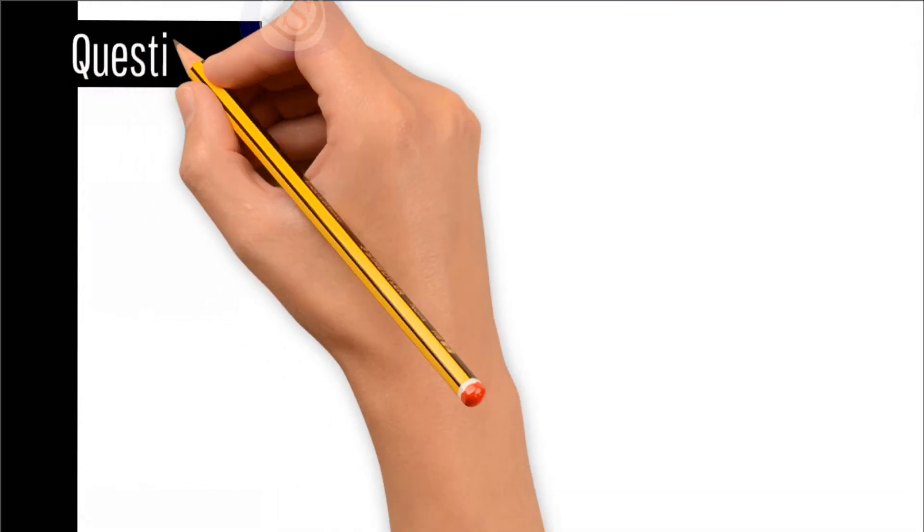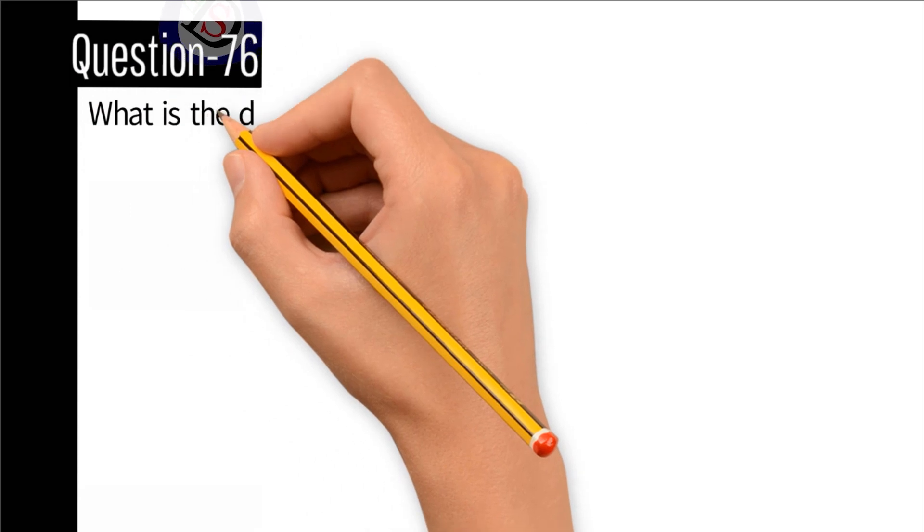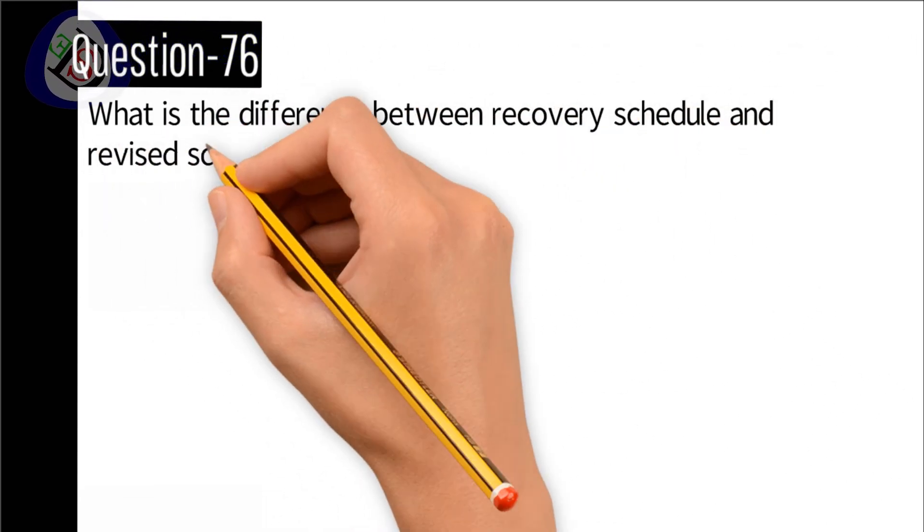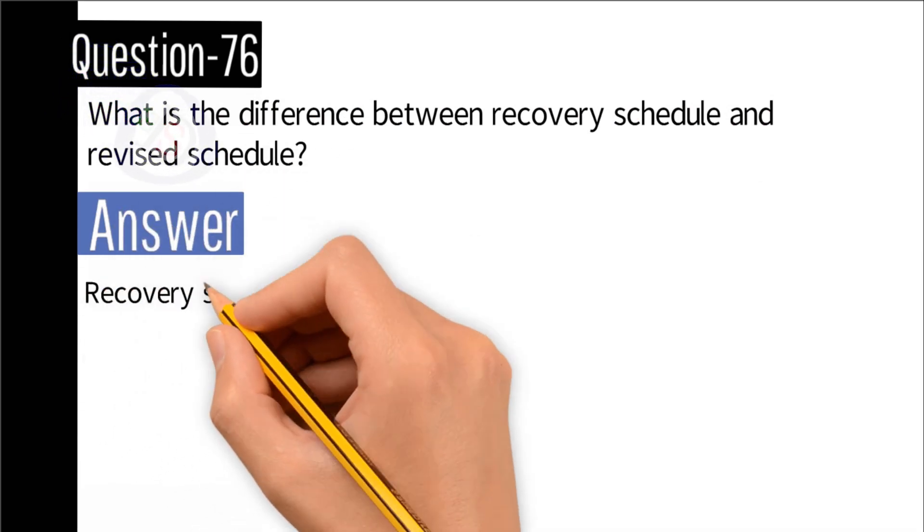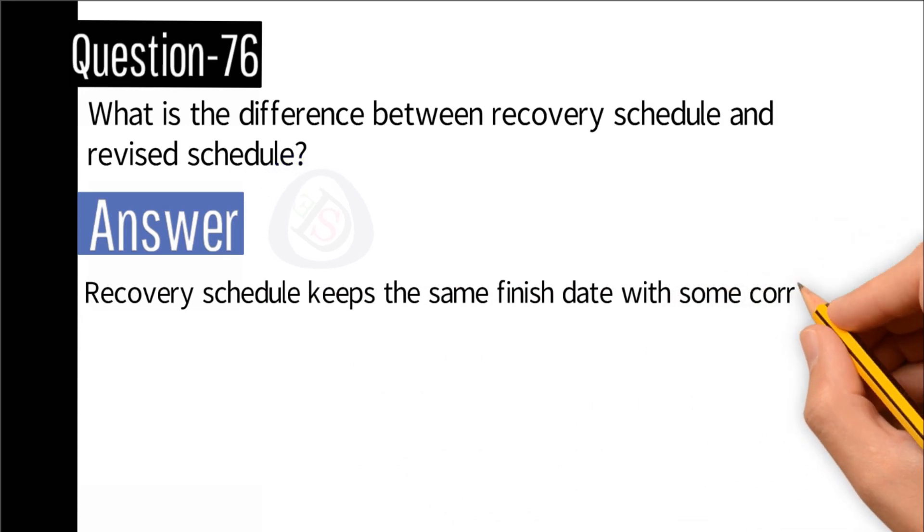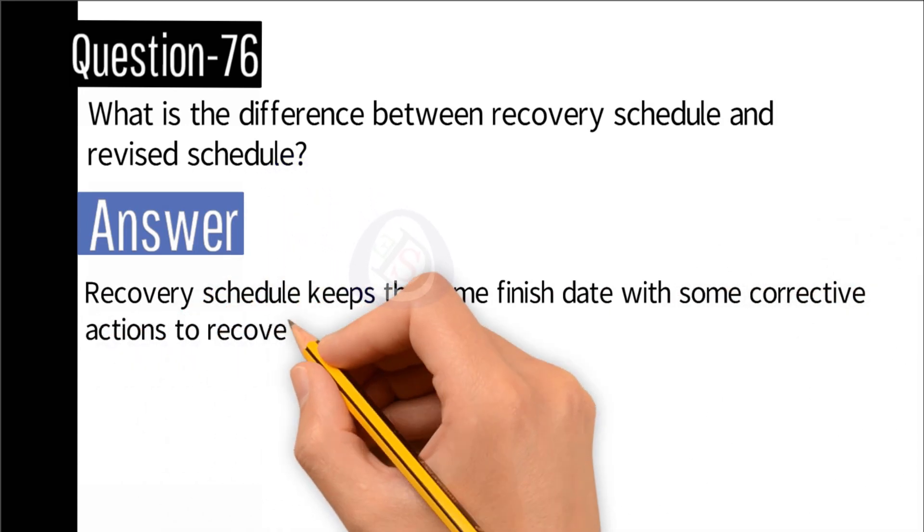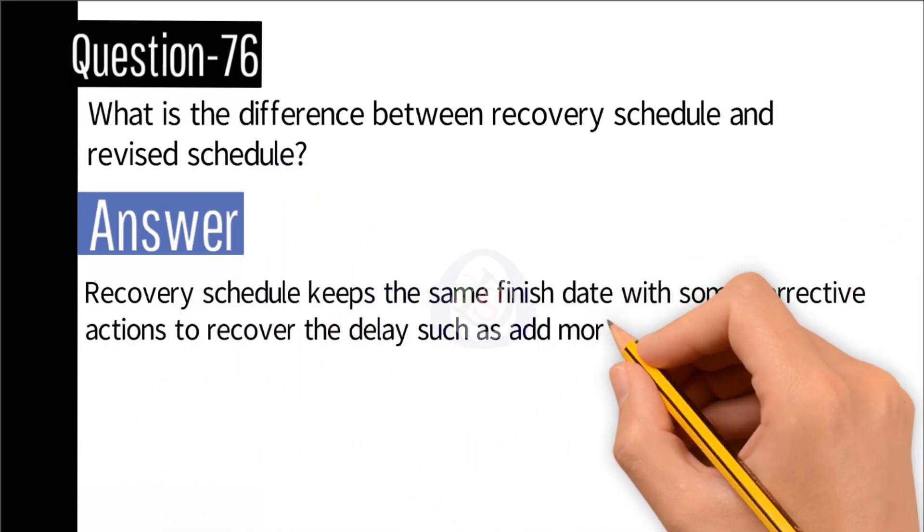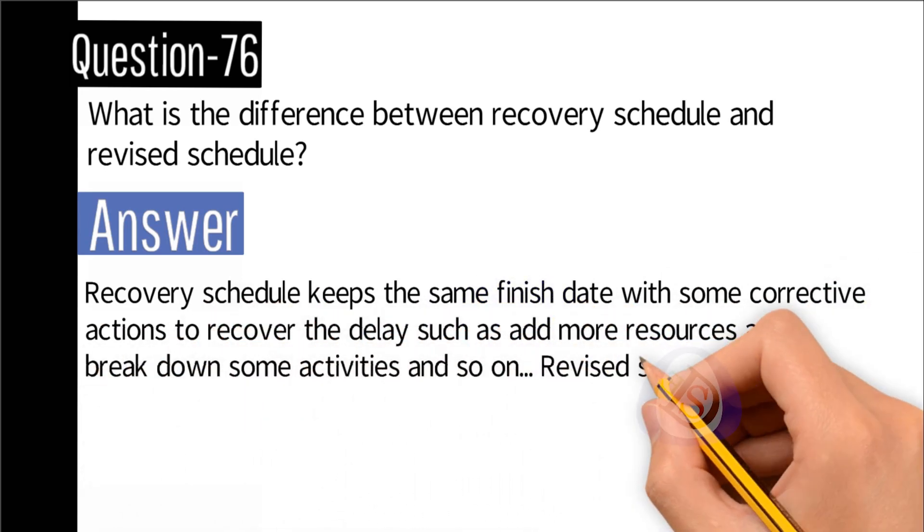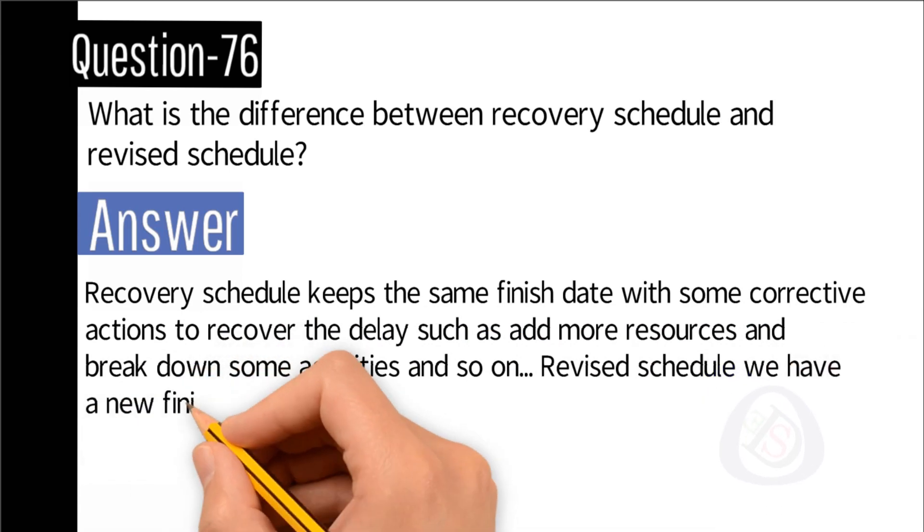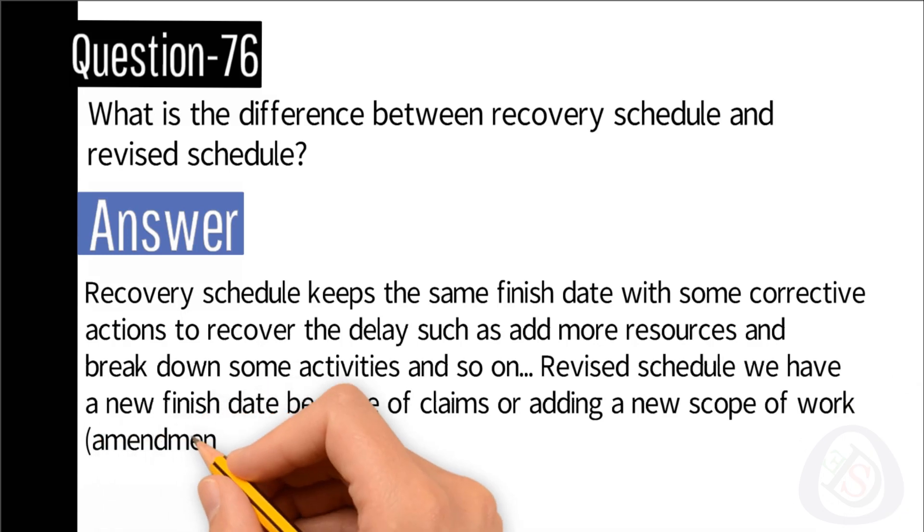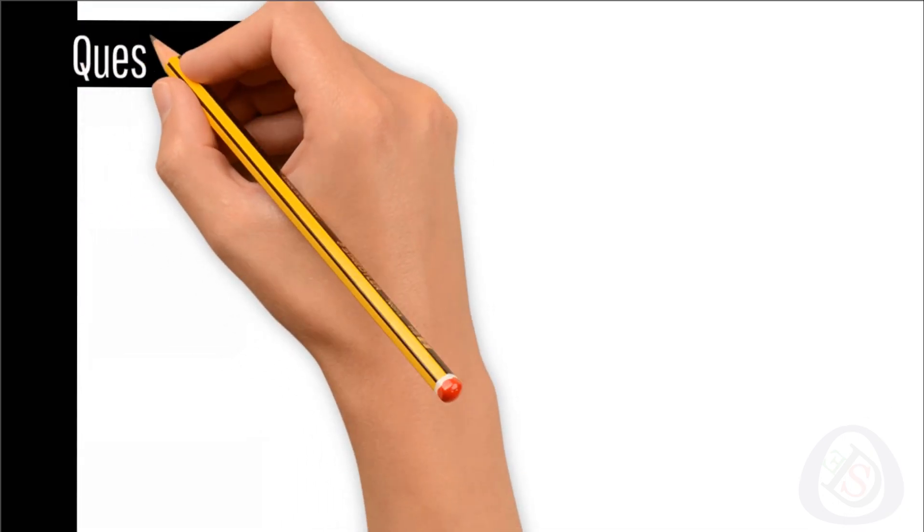Question number 76: What is the difference between recovery schedule and revised schedule? Answer: Recovery schedule keeps the same finish date with corrective actions to recover the delay, such as add more resources and break down some activities. Revised schedule has a new finish date because of claims or adding a new scope of work amendment.